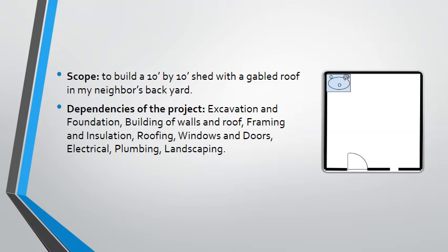The interior will have a small sink in the corner of the shed, and it has to be insulated but left unfinished. The shed will have exterior Hardie plank siding and be painted white. It will have an interior and exterior light fixture. It has to be done within 30 days and the budget is $10,000.